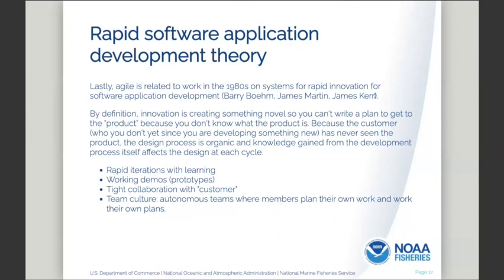And in this situation, again, it's these rapid iterations, and you have exposure of the product. So it's the idea that you make a working product, a minimal working product, a prototype, and then you get user feedback from that. You watch how the user interacts, and then you develop the new thing.